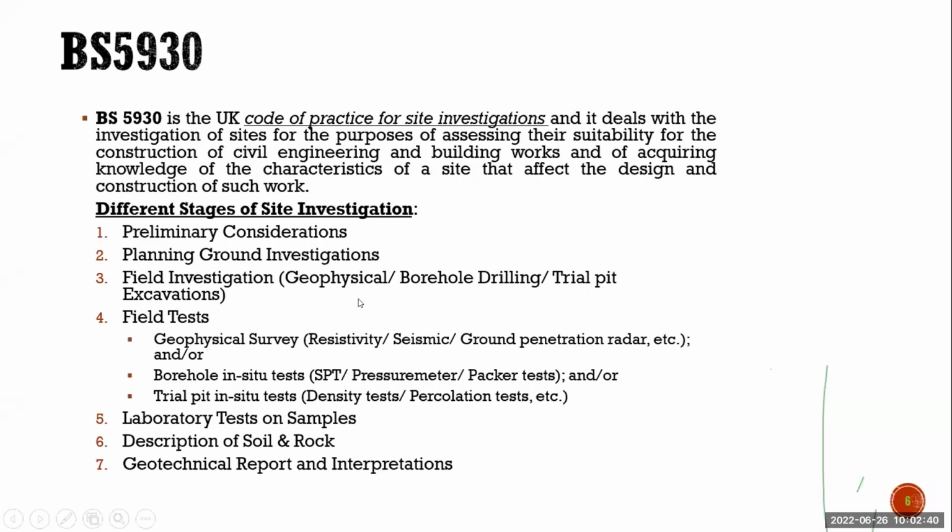So generally in geophysical investigation, for example, based on previous experience, we will know a certain region may have cavities. So they will perform some kind of geophysical investigation to know where the cavities are and at what depth they are available.